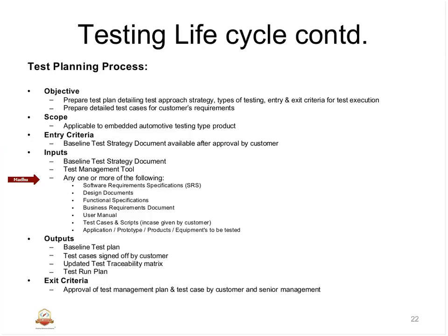that is SRS, design, function specification, business requirements, user manual, test cases, and any scripts given by the customer, and application features, prototypes, equipment that are to be tested from the customer perspective. This all will go into the planning process, because I need to plan what I am going to deploy and how I am going to execute. All this will be laid out as a plan, and the output of this activity will have baseline test plan and test cases signed off by customer.